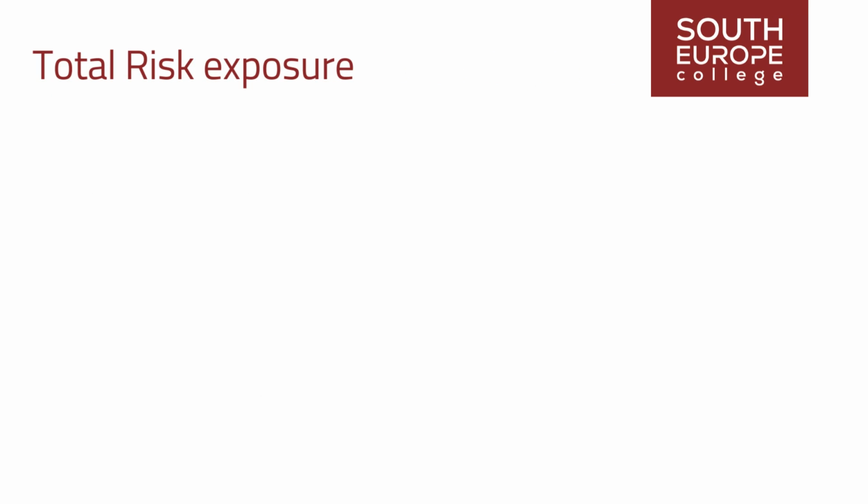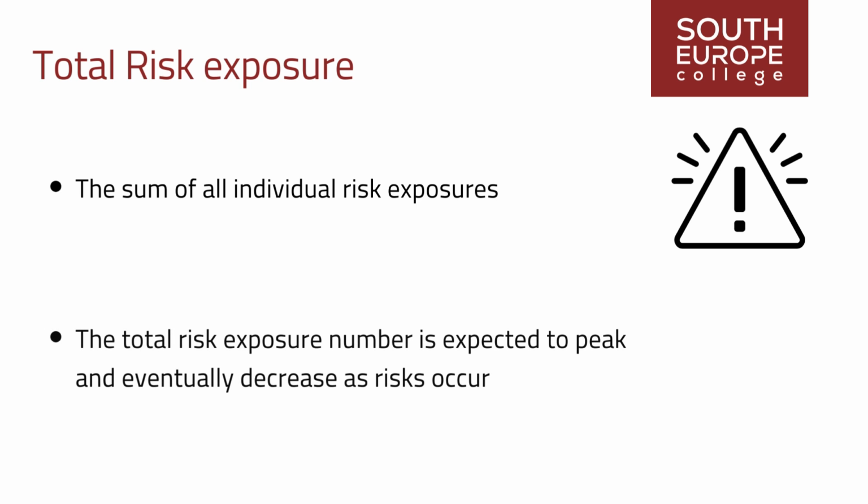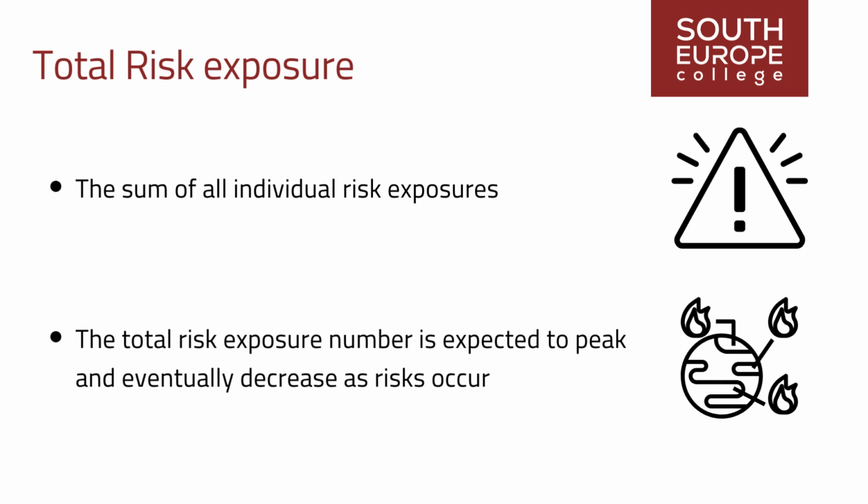Typically expressed in time or money, total risk exposure is the sum of all individual risk exposures. As the project progresses, this number is expected to peak and eventually decrease as risks occur or the time when they would have occurred passes.